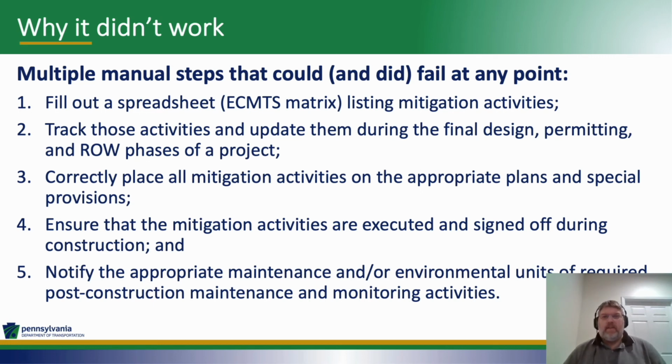And then finally, once the project is all wrapped up, any commitments that we made for maintenance or monitoring need to be handled. Stormwater control facilities are often an example of a facility that needs to be monitored after construction, as are permit-responsible wetland mitigation sites that we create during construction. That all needs to be communicated to the proper units, either county maintenance or back to the environmental unit if they have to monitor a wetland.